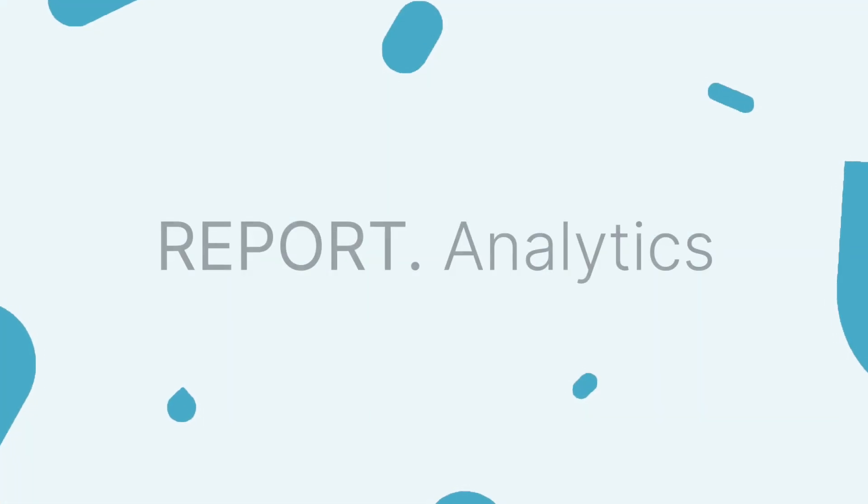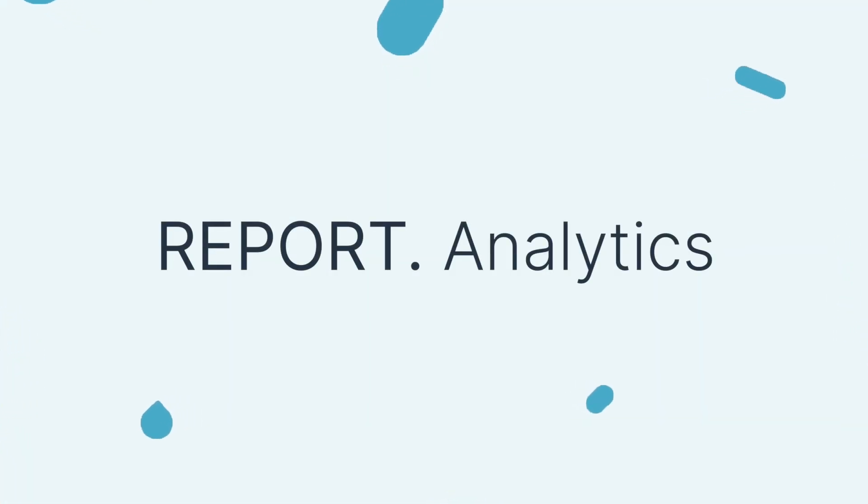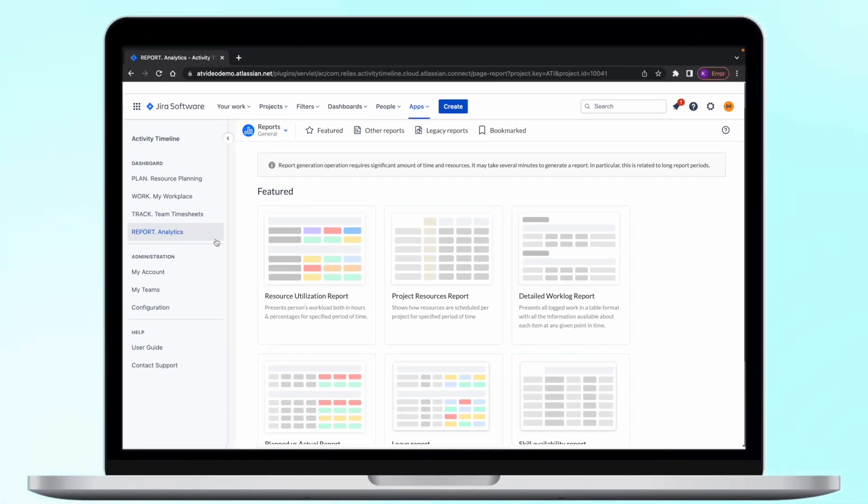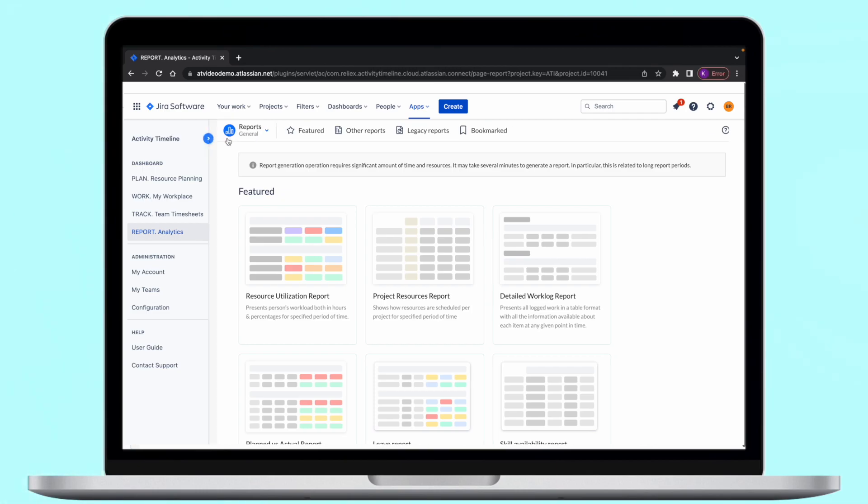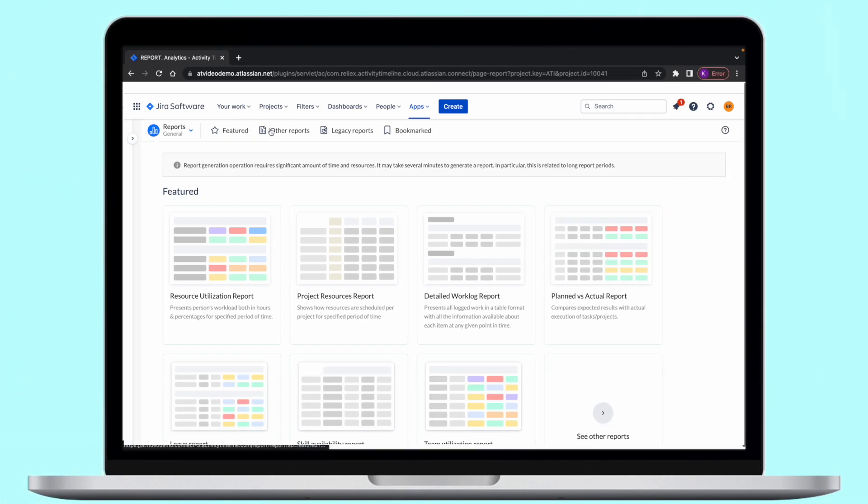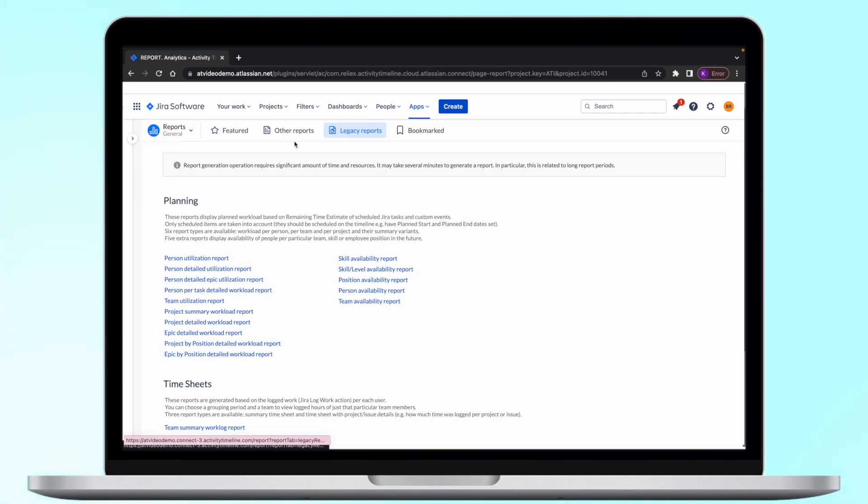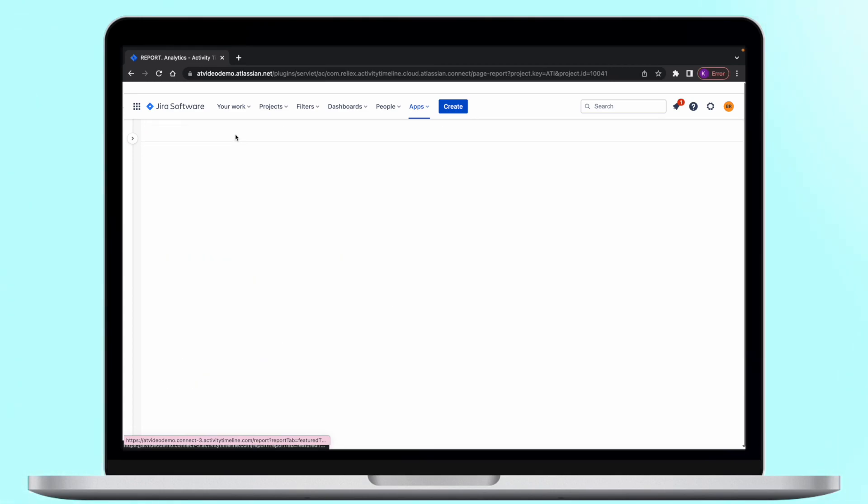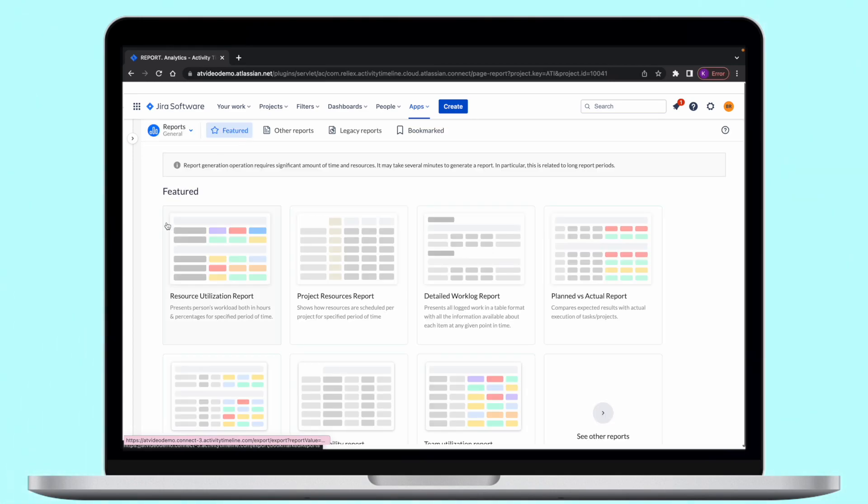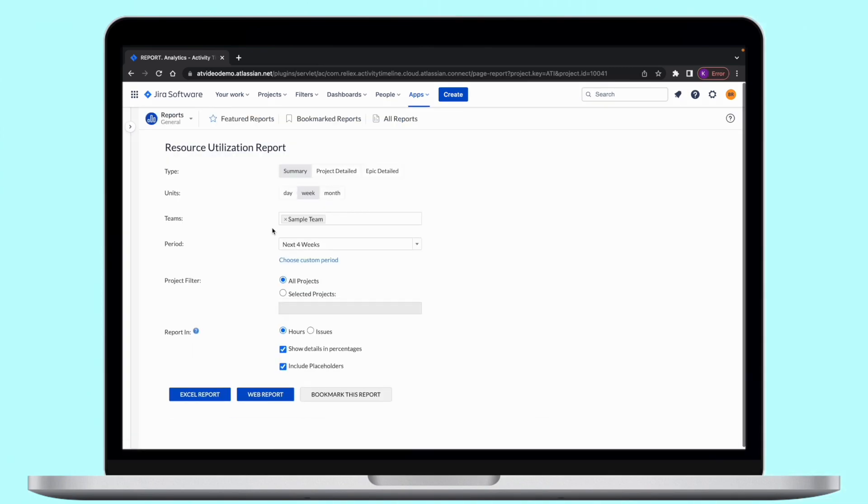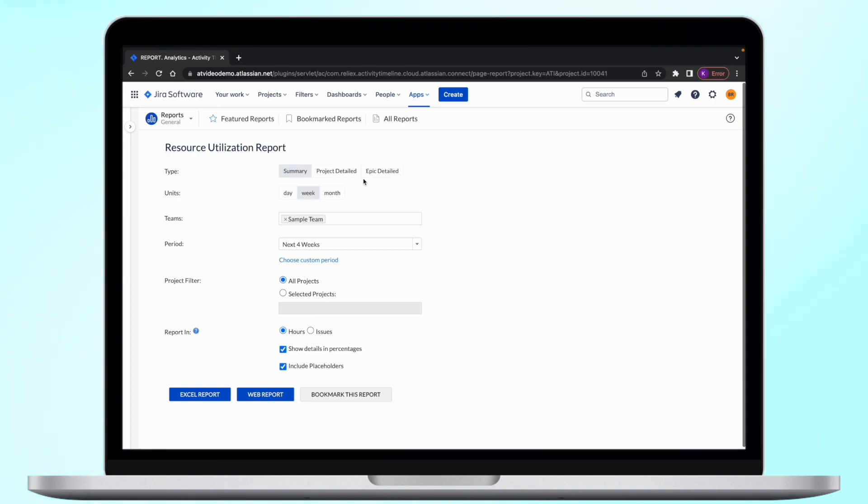And the last module we will cover in this video is called Report Analytics. Here you can get insights into your resource utilization, as well as forecast future available capacity of your resources. The first report we'd like to show you is called Resource Utilization Report. This report provides you a great insight into workload and available capacity of your teams. It can be generated as a summary report or detailed by project or epic to understand how much time is planned for each project.